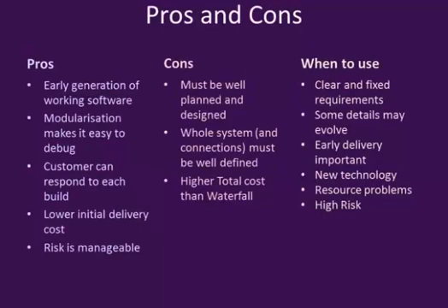The incremental model is best suited to projects where resources may be distributed. Speed is important. An early working model is available. Risks are mitigated by modularization. The interconnections between the builds must be well defined to avoid disaster.